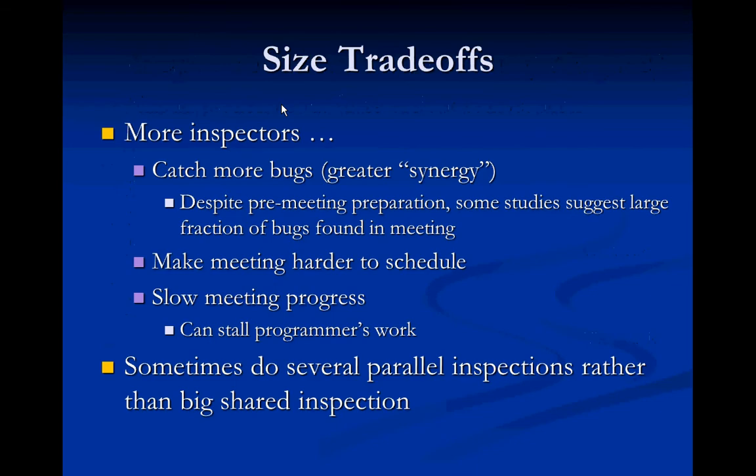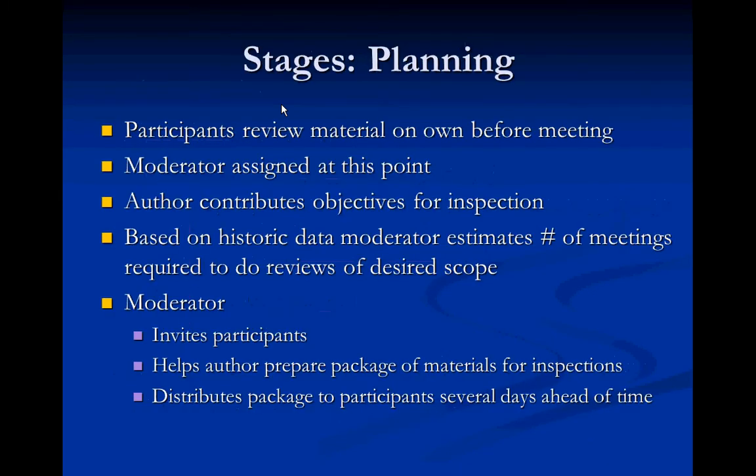You'll want to make sure that you don't plan too much for this. Often you want to plan no more than 100 or 200 lines of code for a 2-hour session. And you want to figure out how you decompose things across different reviews. But I will require indication that everyone here has gone through this.